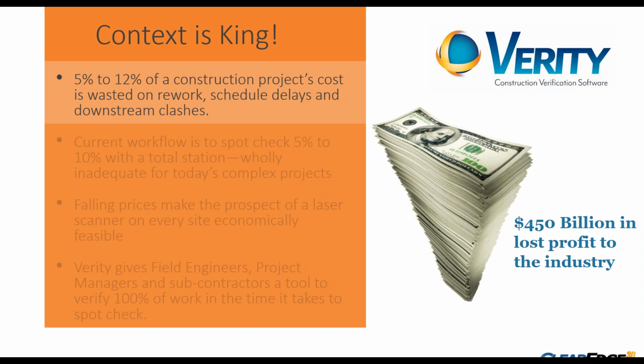And a lot of the different studies that industry institutions, that universities have done point to this range of between 5 and 12% of a construction project's cost being spent on rework and the various different costs that accrue as a result of those field mistakes that cause rework. And so if you span that out across the entire construction industry and go with the low end of that number, that means about $450 billion every year goes towards rework and the associated costs. So that's not a small amount of money in our industry that's spent on this problem.